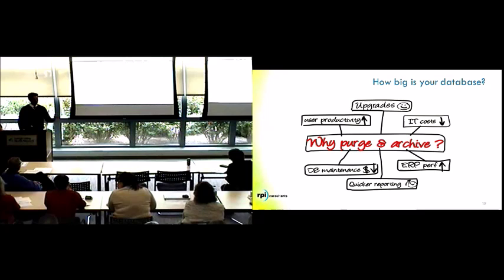I skipped right over it because it's like a foregone conclusion that that would be provided. I'm just giving you all the heads up. Ask for that. When your migration's complete, make sure you're getting the target and source table count, record count, so you know that everything you started with made it across, especially in a database migration, because things can get lost if you don't have all the tooling right.